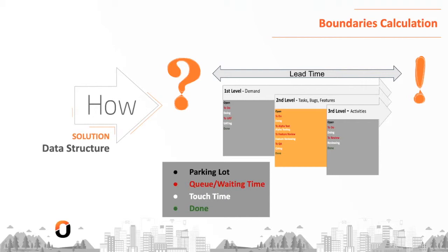At the third level, we have the day-to-day activities. These are the smallest pieces of work: planning, development, testing, deploying. They shouldn't last more than 3 days, and any change to the scope will affect those project boundaries. Cancellations are such. On to the timeline. We calculate it using lead time, which is both your waiting time between tasks and the touch time. Your next cost boundary.